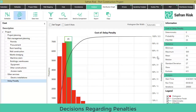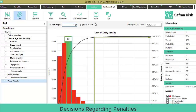You can also ask the inverse question: given expected bill management revenue of $120 million, what is the probability that penalties will eat up all of the expected profits? Simply click on the Set Target button on the upper left-hand side of the chart and write $120 million. You will observe the shift of the vertical delimiter line to the 99th percentile, calculating a cumulative probability of 99%. Therefore, there is even a 1% chance of eroding total expected revenues given the current penalty structure.